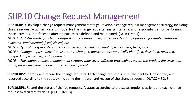Develop a change request management strategy including change request activities, a status model for change requests, and analysis criteria and responsibilities for performing these activities. Interfaces to affected parties are determined, defined, and maintained. You need to document how you are going to identify and document change requests, what statuses they will have — such as open, closed, under review, or under analysis — and what the analysis criteria and responsibilities are, including who is on the change control board and who is the approving authority.